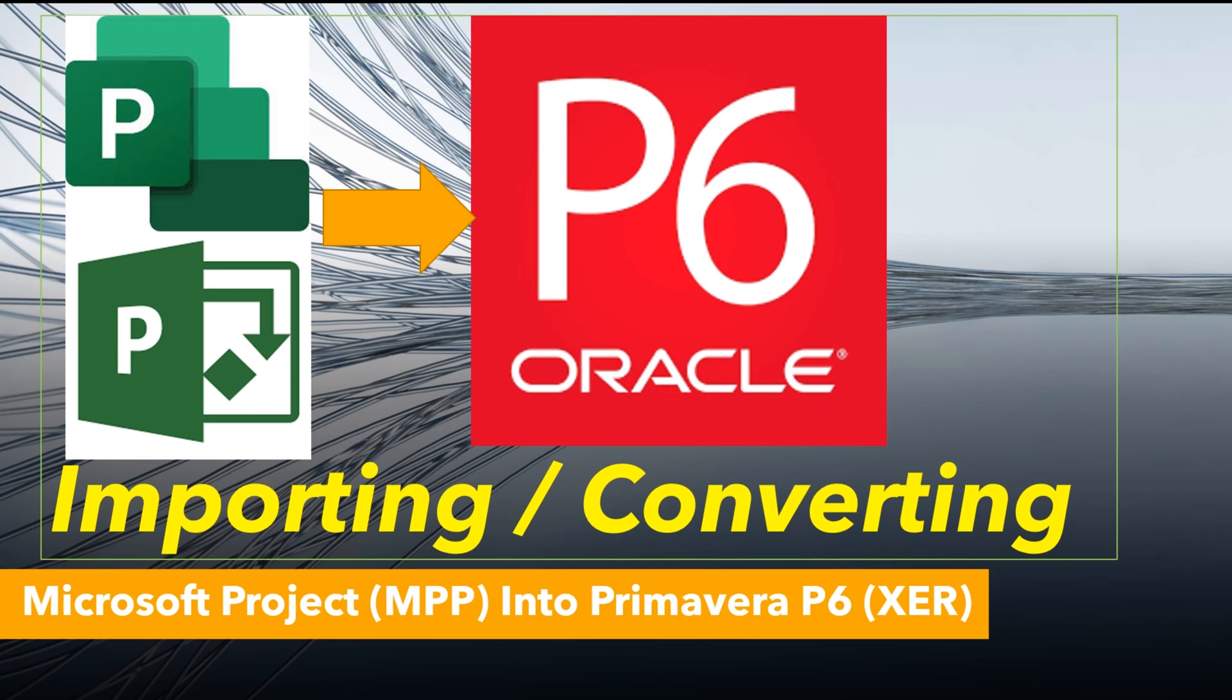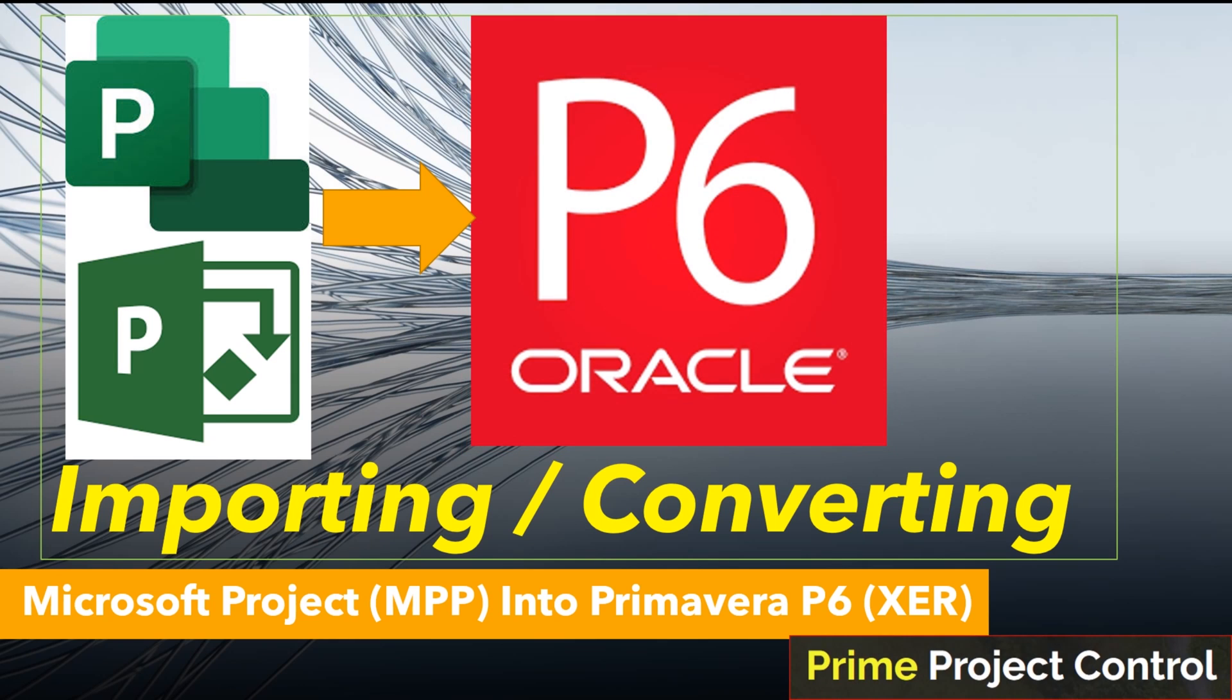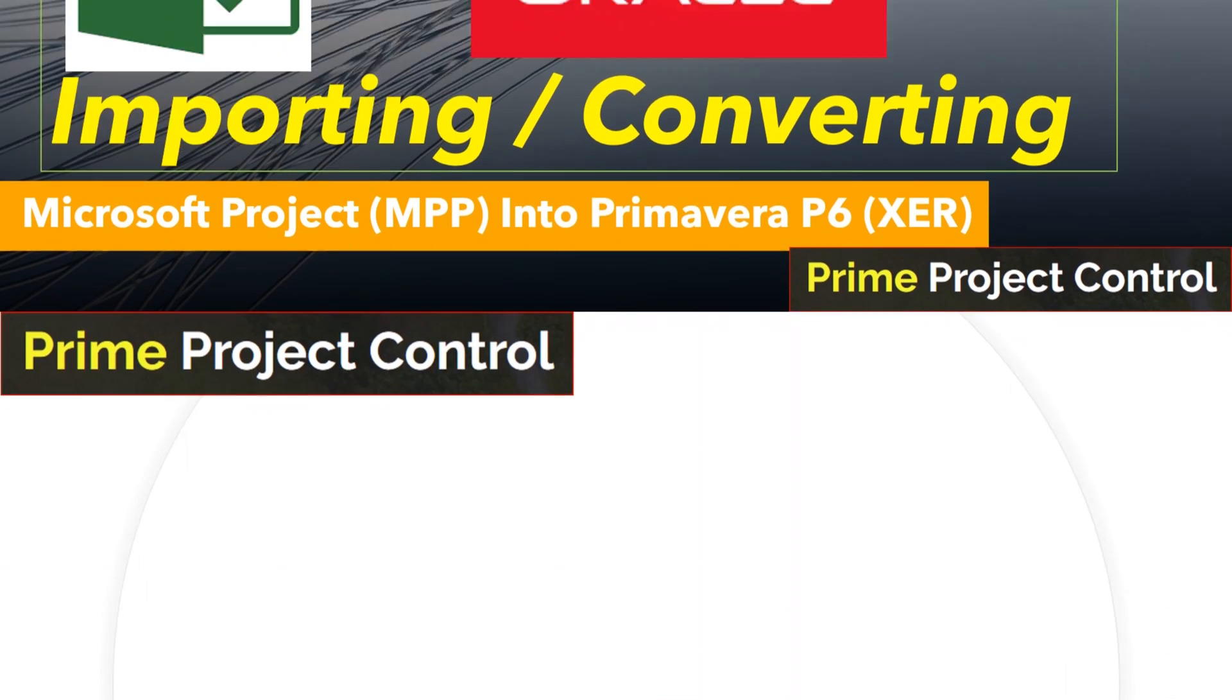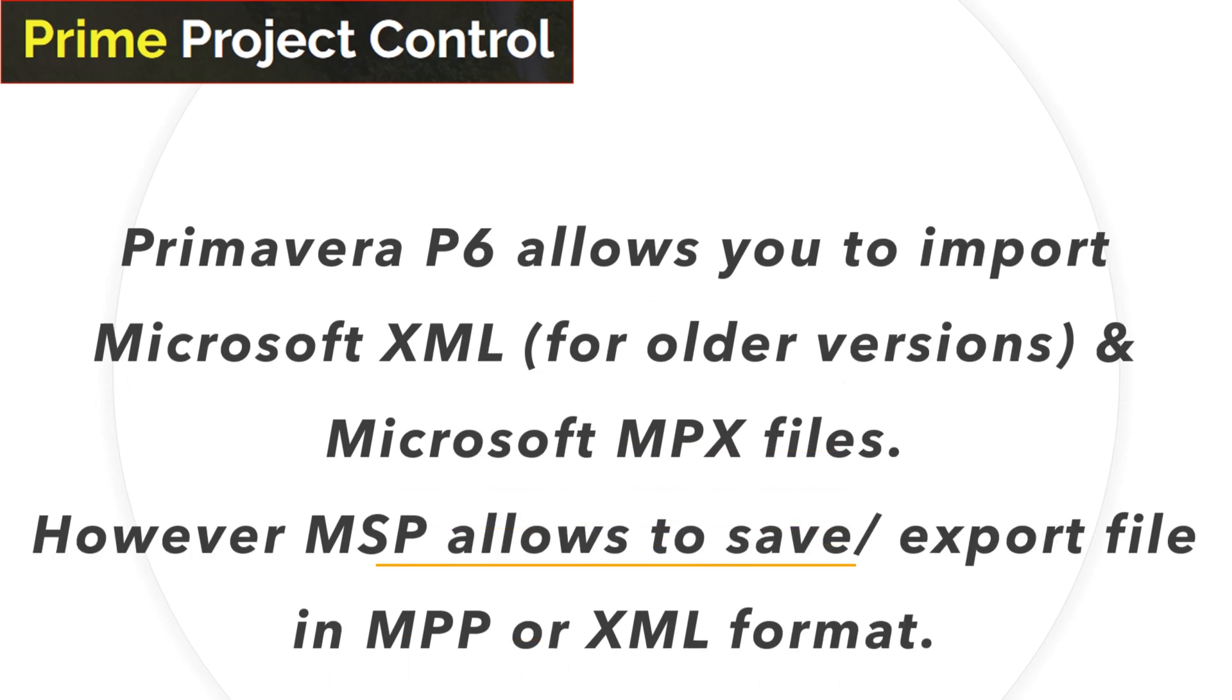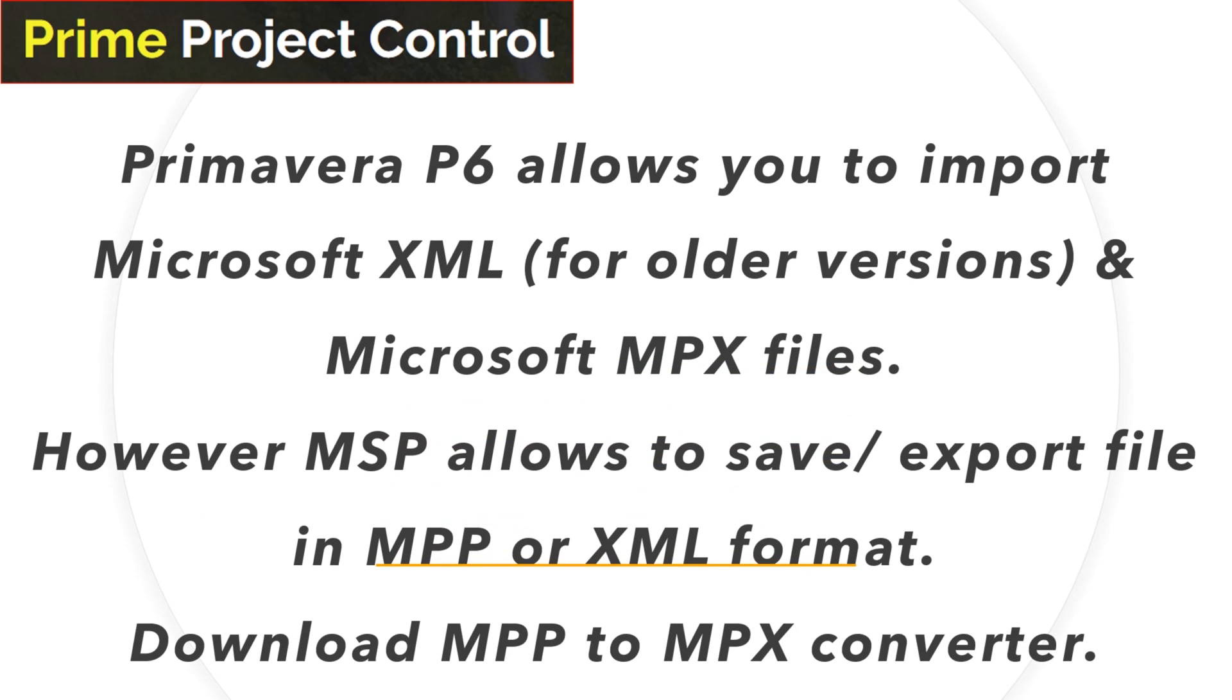Hi friends, today we learn about converting Microsoft Project into P6 file. Let's begin with the process. Primavera P6 allows you to import Microsoft Project in XML format or MPX format only, but Microsoft Project can only save or export files in MPP or XML format. We need to convert the MPP format into MPX file format.